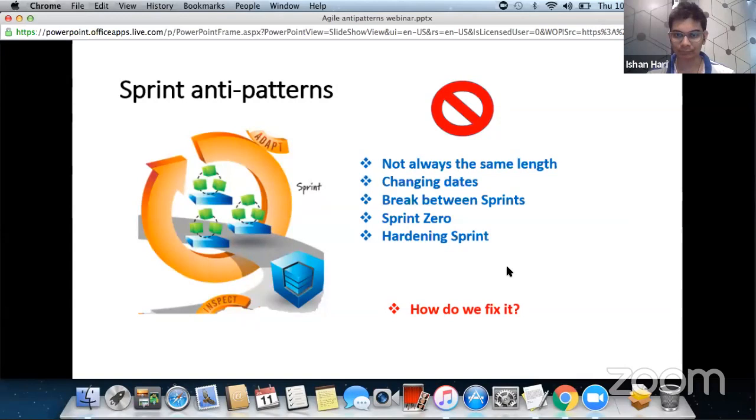Other estimating techniques are basically just sizing, right? Sizing based on numbers, sizing based on t-shirts. T-shirt sizing is also another way. The challenge with t-shirt sizing is that if you want to gather and collect that information, you have to tie it back to a number, using some sort of tool like Jira or Rally.